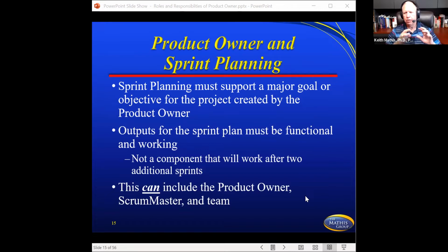And so one of the things that almost all your authors in Agile and Sprint and in Scrum have really emphasized has been that whatever you finish, try to finish it within 1 sprint. What work can we do for 1 sprint and get it to the customer? And that mindset throws us off a little bit, because sometimes you find those things that it requires a couple of sprints to get that piece done.